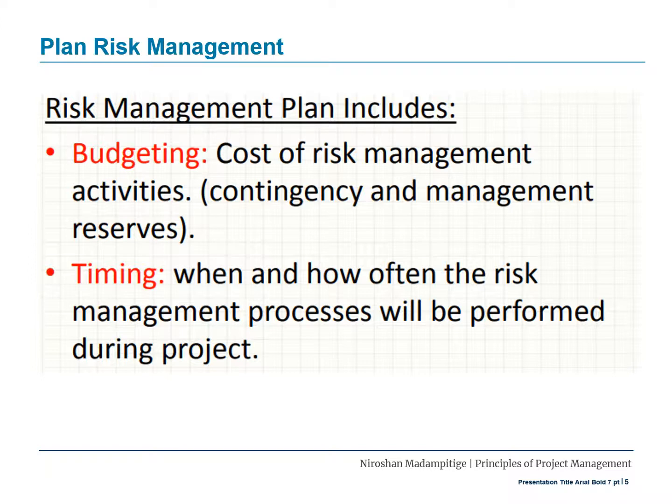The risk management plan also includes budgeting — the cost of risk management activities — because what you do to manage risks should be approved by the stakeholders and the clients. Contingency and management reserves will also have to be decided during risk management planning, as they allow you to be successful even if you exceed the base budgets. It also includes timing: when and how often the risk management processes will be performed during the project.